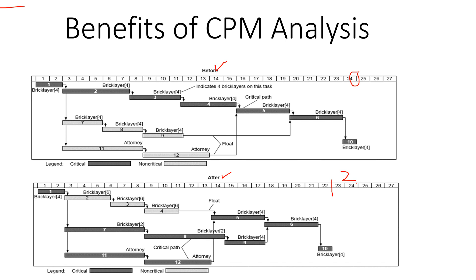Now we are going to analyze what process was used to save that time. Here you can see the examples of resources overlaid on the bar chart. For instance, task one has four bricklayers, task two has four bricklayers, task four has four bricklayers, and likewise task seven has four bricklayers.